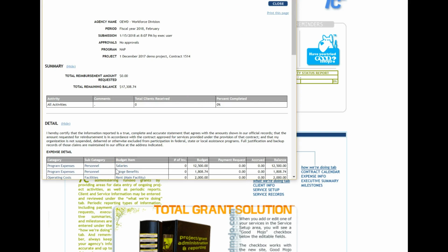A couple of notes about budgets with deliverables. A deliverable line item becomes payable when your OED program officer, project manager, or program manager confirms that the item has been received and meets the agreed to specifications. If you're invoicing for a deliverable line item, you must upload written confirmation from your PO or PM that the deliverable was accepted, and this confirmation must be dated within the term of your grant or contract agreement.